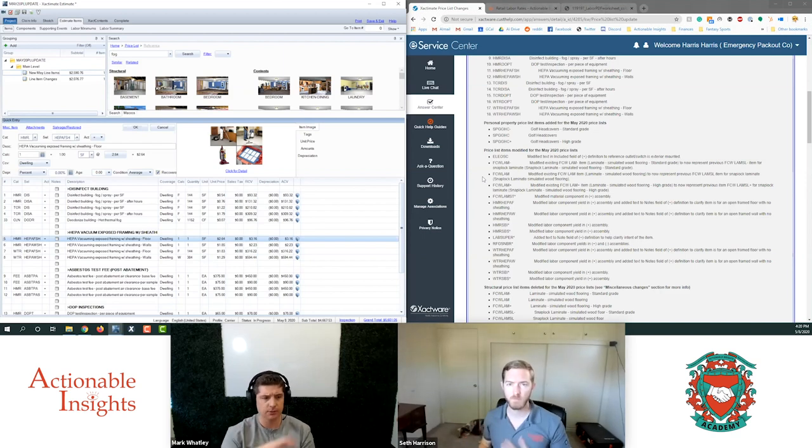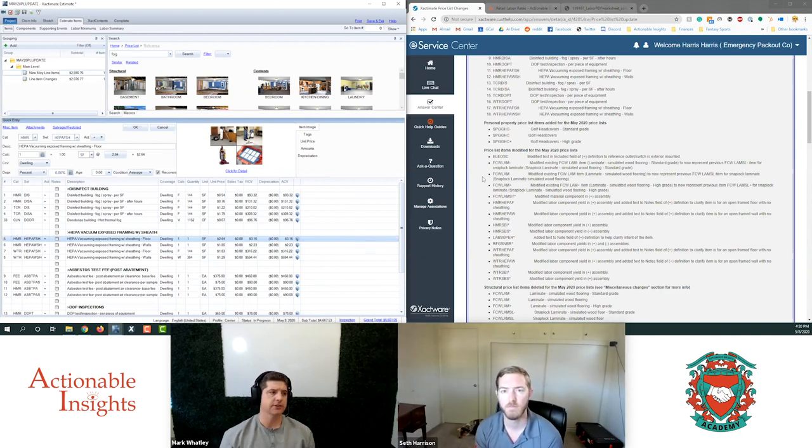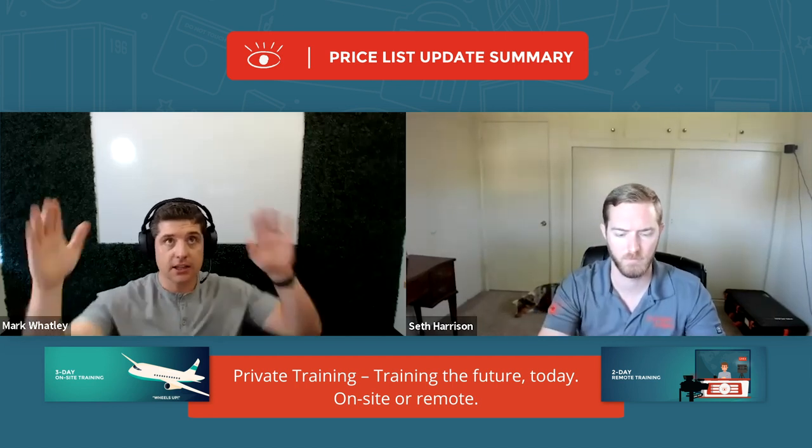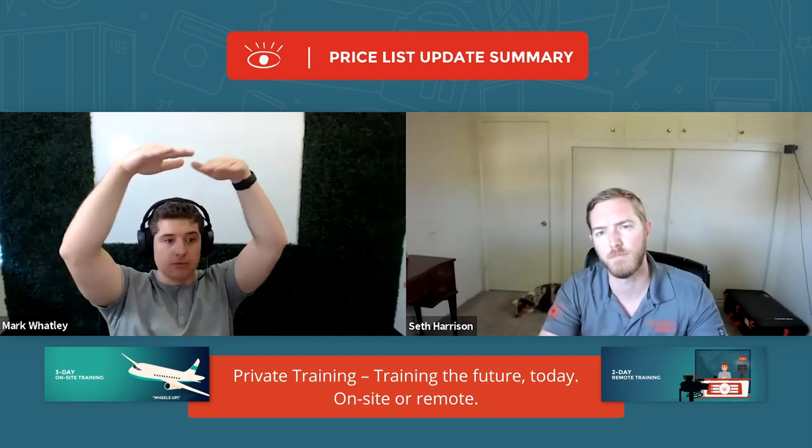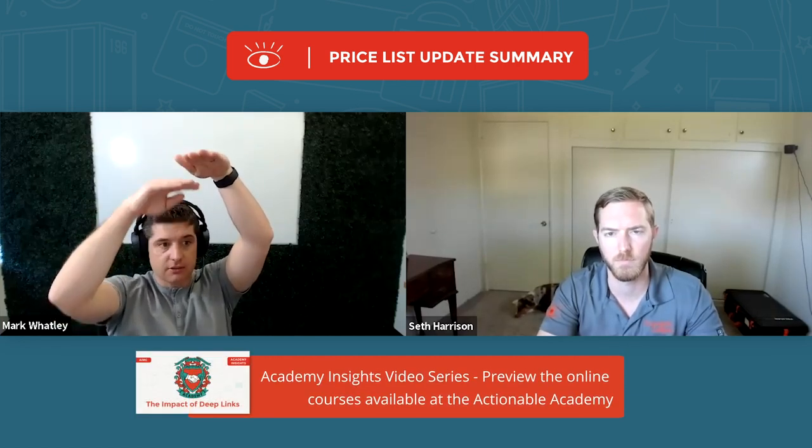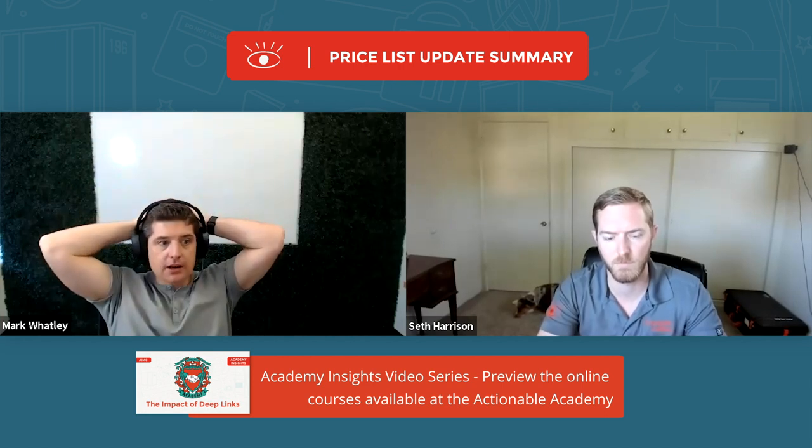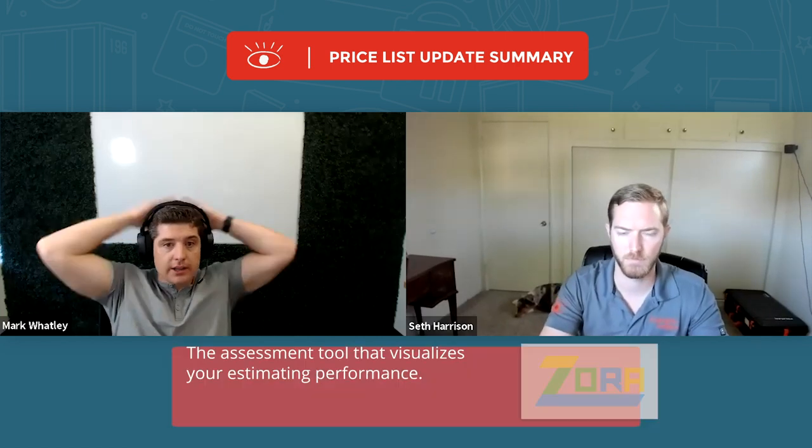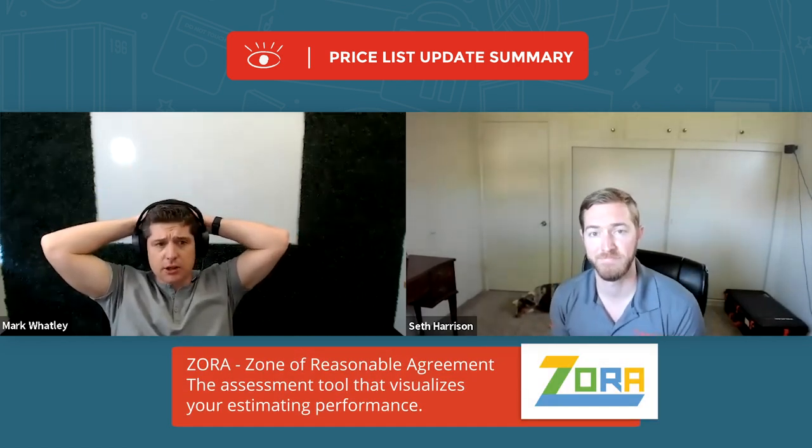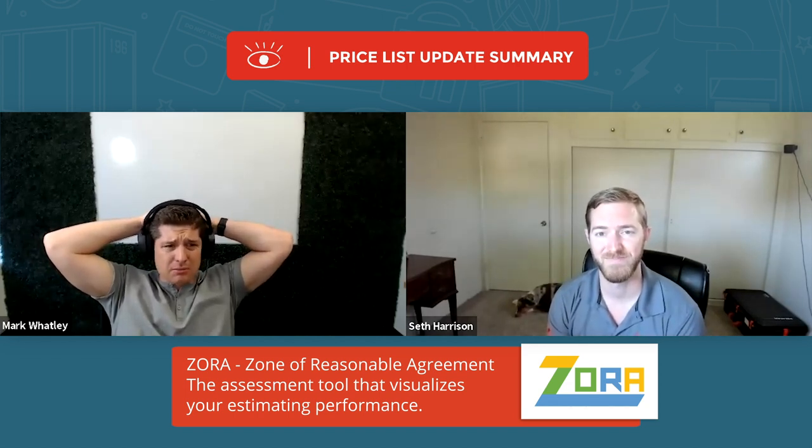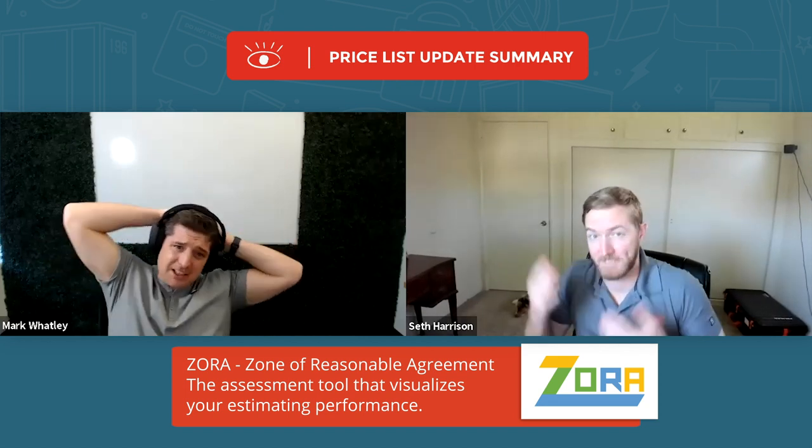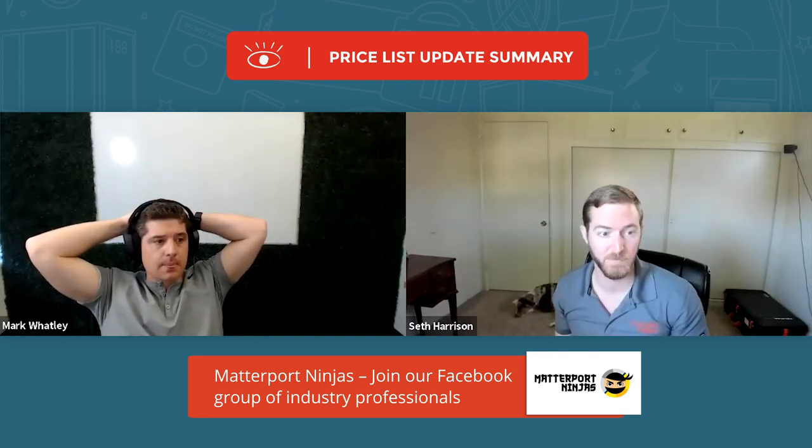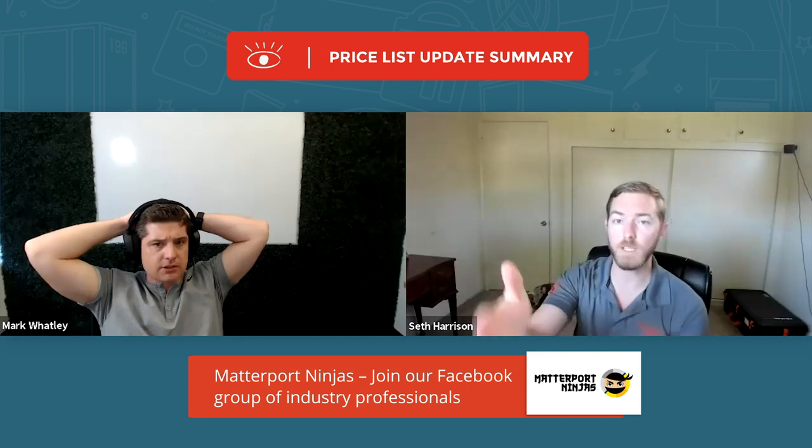And so the way to resolve this is the same way. They should just add sheathing as they did here for soda blasting and for the dry ice, and then they're good to go. And then you could actually eliminate the CLN line items altogether because I think the existence of those former legacy six line items with the addition of the new line item, nine line items is, is although a step in the right direction, there's going to be a lot of confusion that emerges around that once you get outside of exposed framing because sometimes there are, there's plenty of scenarios where you're doing dry ice blasting and you're doing say, a ceiling joist on the first floor. And then you're dry ice blasting also the sheathing. That's really the flooring for the level two, right? And so I would not know how to estimate that with the addition of those new line items last month. I don't know how to wed those CLN line items. What are you going to do? Take the CLN line items and adapt a trade code to HMR, but then you would increase the yield to contemplate the additional efficiencies and thus reducing the price. Yeah. It gets messy.